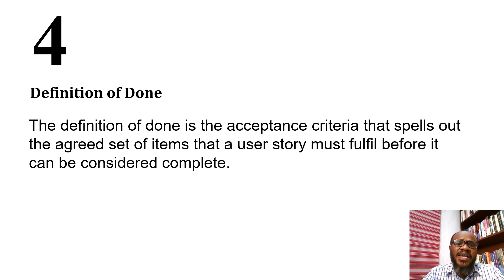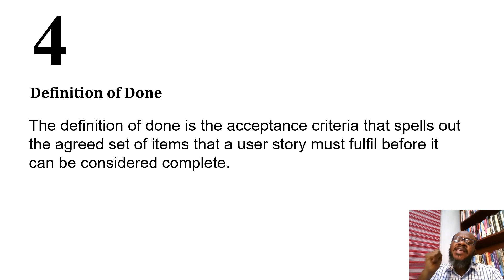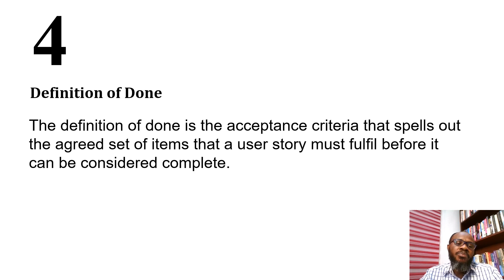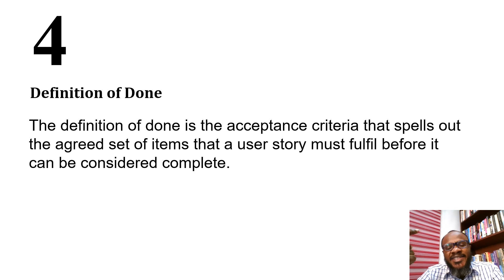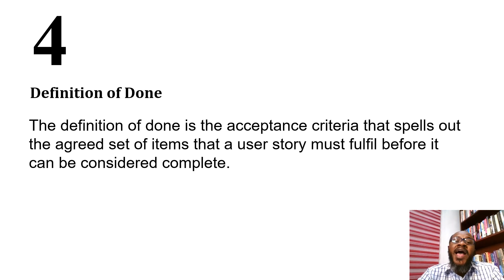The next item is definition of done — also a criteria. Definition of done is the acceptance criteria that spells out the agreed set of items a user story must fulfill before it can be considered complete. Developers need a guiding criteria as they work. Definition of done describes what done looks like — how the functionality must work before we say it's complete.